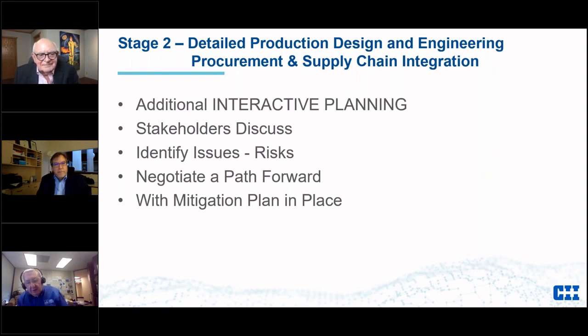And Dan, you talk about integrated project planning. I have projects where we actually bring these subject matter experts into the office, like you're saying. If they're working with me in the office, they don't need 2 weeks. We can sit down with them, and I can approve that in 1 day. But if I have to transmit that all the way out to Tim, and it sits on his desk for a week or two, and he might or might not get around to it, then I'm up a creek. So integrated project planning, or delivery, is really critical here.